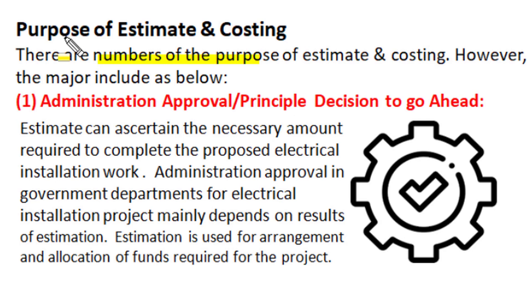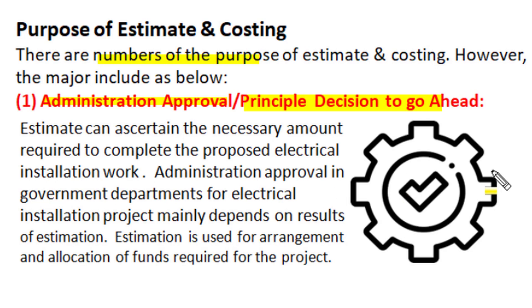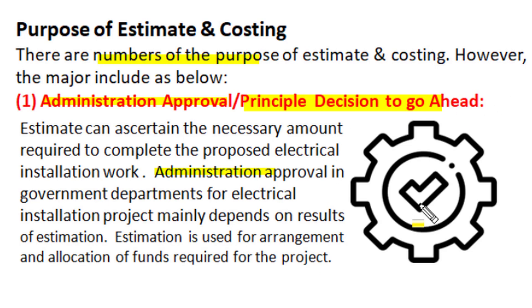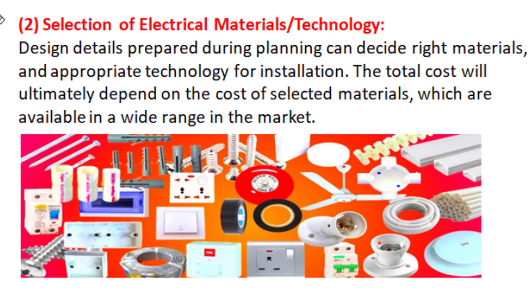There are a number of purposes of electrical estimation and costing. One significant objective is to obtain administrative approval for the project — the principal decision to go ahead on project execution. In an estimate, we ascertain the necessary amount of financial resources required for material and workmanship. In government and organized sectors, administrative approval from top officials is necessary to initiate any electrical installation project, and that approval depends on the results of estimation. Rough estimation results are used for arrangement and allocation of funds, and only after availability of funds and technical sanction can a project be initiated.